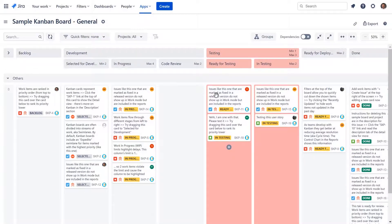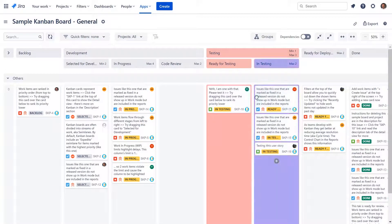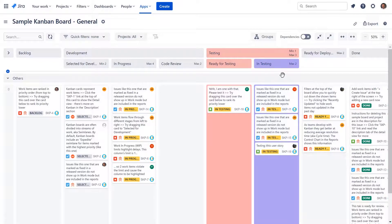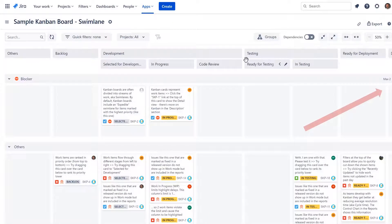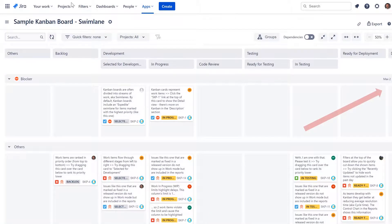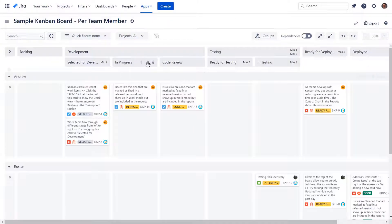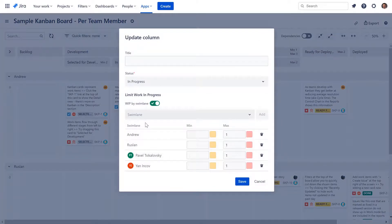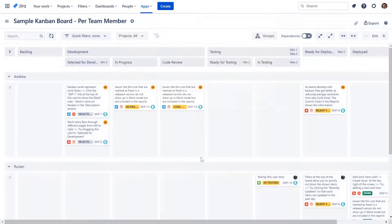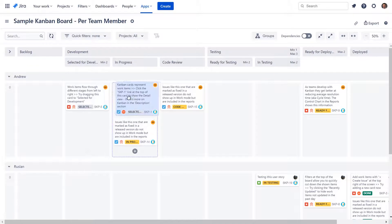In comparison to standard Kanban boards in Jira, you can crop your columns and define work-in-progress limits for a column or column group at the same time. Also, it can be defined on the swimlane level.